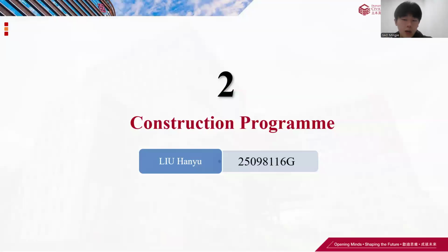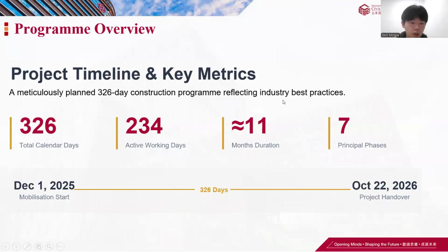Hello, I'm Liu Hanyu. The overall project is scheduled to start from December 1st, 2025, and concludes on October 22nd, 2026. This spans a total of approximately 234 working days, effectively fitting within the stipulated 12-month period.